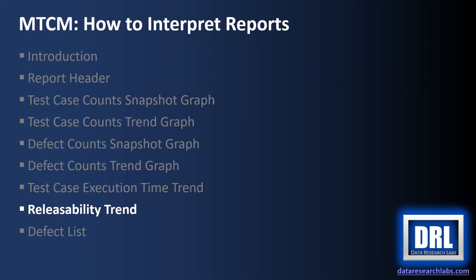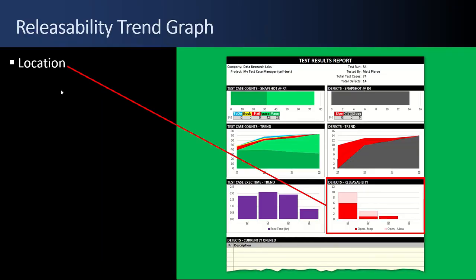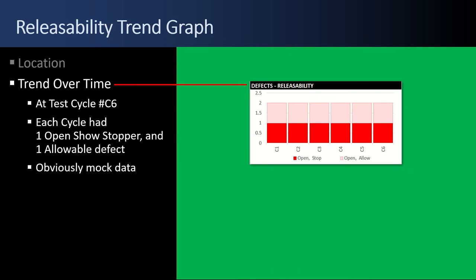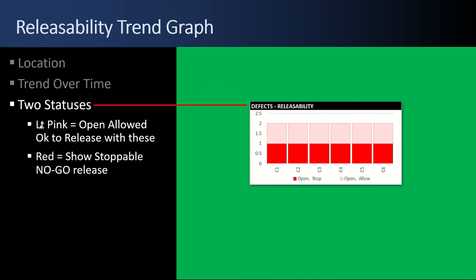Next up, the releasability trend graph. This is located in the lower right of the defects section on the right hand side of the reports. This is also a trend over time report. I look at it and know that we're at test cycle number six. I know that each test cycle had one open showstopper red defect. There's a bug in the tool. There should not be a 0.5 and 1.5. I'll fix it and release it.